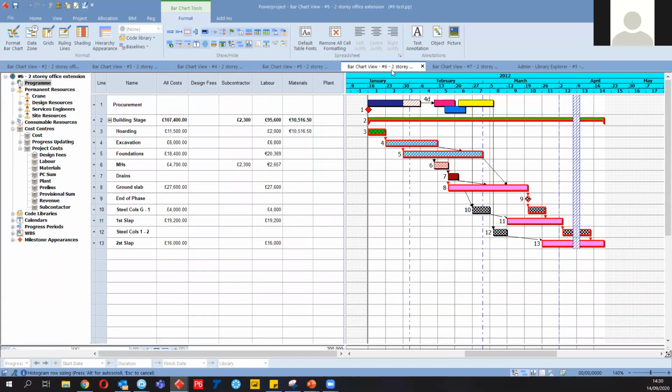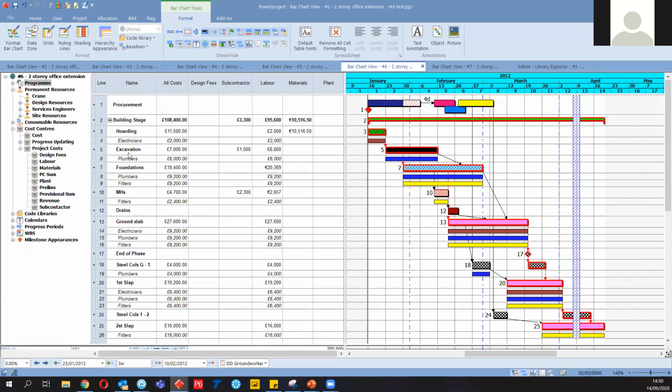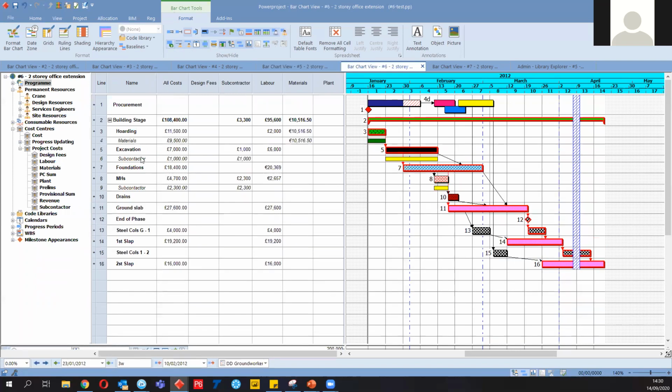So if we move to cost estimation, maybe we are on the controller side or we are not dealing with specific resource-based cost assignments, then we can directly input an expense, like for the excavation work. Directly we can allocate this subcontractor cost information to our excavation work, which will not be a cost resource, but let's open the cost assignments. You're going to see again as a bar under the excavation, which is going to cost in total 1,000 pounds.